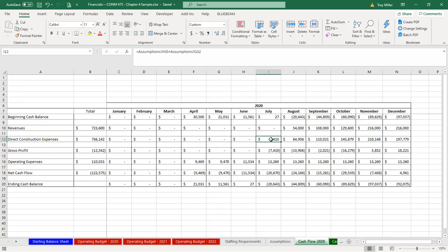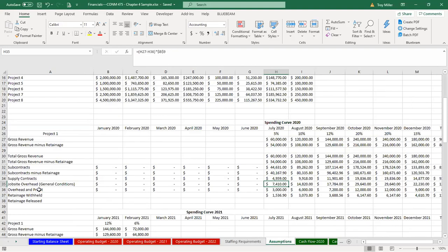And then when we get paid during the next month, that's when we would actually make that direct expense to the subcontractor. So essentially, I've got direct costs right here to the project, which, coming back to my assumptions, is my general conditions.